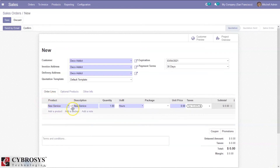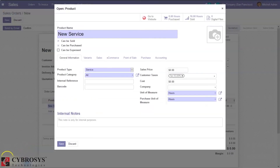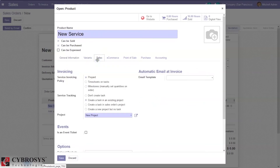We have already created a product called 'New Service'. If you go to the external link, you can see the product type is set as service, because we are creating a sale order and invoice for a service product — a task. When you set product type as service, under the sales tab you can find the service invoicing policy and service tracking for the task. We can create invoice prepaid — based on order quantity, based on timesheet, or manually.